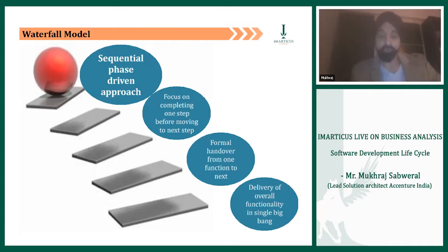The good thing is, guys, it's very focused. Unless one phase finishes, the second phase doesn't start. That's great. But please understand that while you employ this methodology, you are increasing your software development time. What if, while Rajesh was building the requirements, the initial requirements could be dropped into the design cycle so they could be quickly designed, then dropped into the coding cycle, completely coded, and dropped into the testing cycle? While this is happening, Rajesh is bringing in the next set of requirements from his stakeholders.